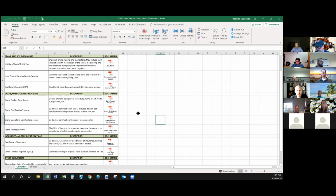We are testing this. I actually managed to implement it on our Cal State student housing job site. And it literally took me 30 minutes, from visiting the job site and pulling the foreman outside from his day-to-day work to organizing it with a crane vendor. The beauty of this crane pick plan is that it covered 3 different pick locations. That means the crane's going to come in on 3 different days for 3 different curtain wall towers. I gave the whole thing to a person who had never done a crane pick plan, and he was able to gather all the documentation from the vendor, create our specific documentation, and send it to McCarthy in a single submittal without kickbacks.